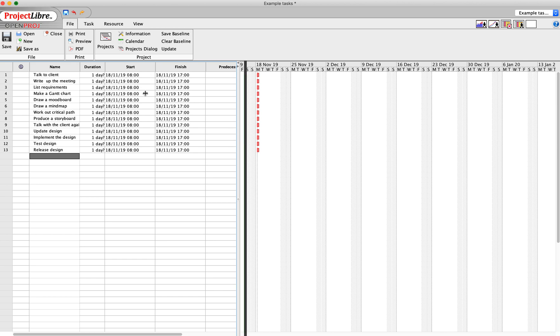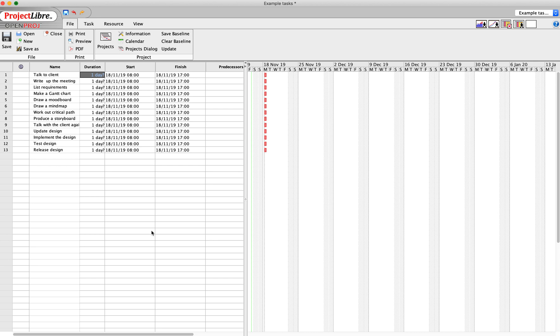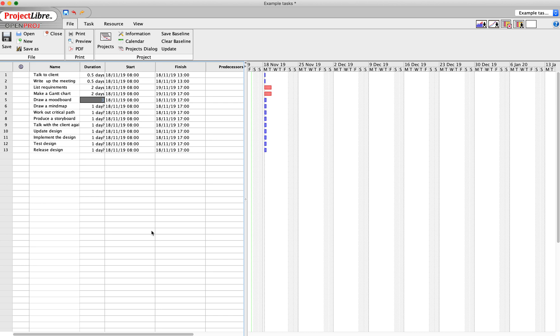As you can see at the moment, I've said they all last a day, which isn't realistic. Maybe talking to the client is going to be 0.5, so half a day. Writing up the meeting is another half a day. Listing the requirements takes two days. Making a Gantt chart takes two days. Mood boards are really slow, let's say three days. Also going to take me three days to draw a mind map. Critical path is going to take me two days. Producing the storyboard...